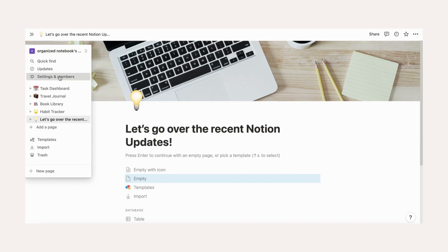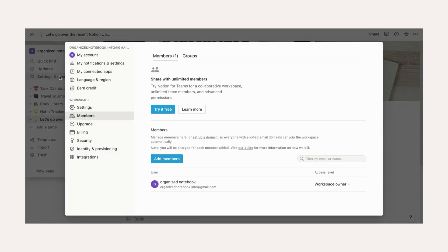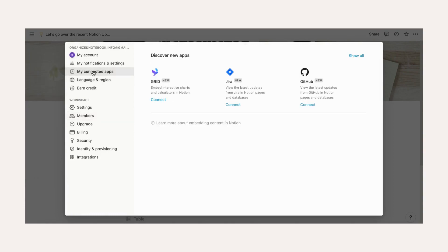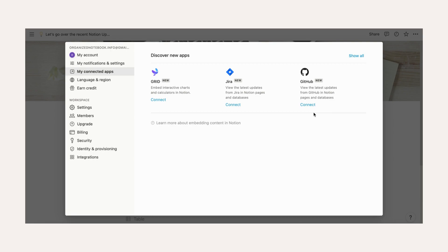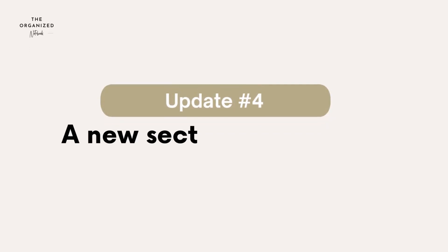First, go to Settings & Members on the left-hand side of your Notion account. Click My Connected Apps and connect Jira or GitHub. Then, you'll be able to paste the link from Jira or GitHub that you want to show as a database. When pasting, you'll have the option to paste as a database. All the information will be synced there and you'll also be able to customize the way the database items are displayed.